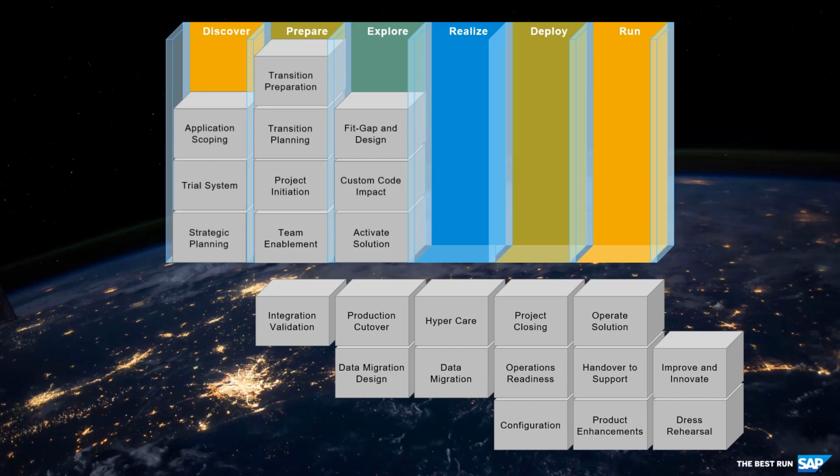The results from the value and implementation strategy will feed into the fit gap analysis and delta design workshops. The purpose of fit gap and delta design is to validate the predefined scenarios and enhancements in scope for implementation and identify potential gaps between the delivered product and the customer's requirements. In case an SAP Model Company is used to support the fit gap activities, additional pre-configured scenarios are already available. Gap validation and a final design review support this activity, which is usually executed in an agile manner.